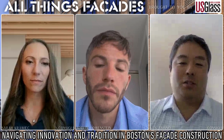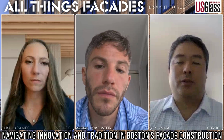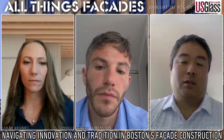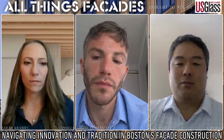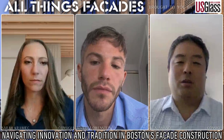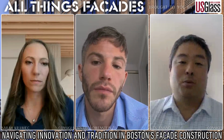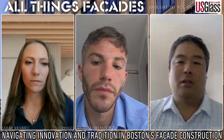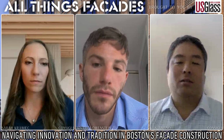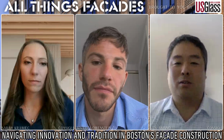So a lot of these lessons learned that I think Sarah was talking about, whether or not they're mock-ups or not, we're finding that in the last 5 years we're needing to accelerate this. It used to be that we had the traditional CMGC post-mortem of a project, right? We figure out what we could have done better, what was good, and then we try to pay it forward to other projects. But we're getting to a point now, with technology, that we need to understand what the lesson learned is now, and then literally get into our pre-construction projects so that we buy it outright if we didn't, the first time, right?